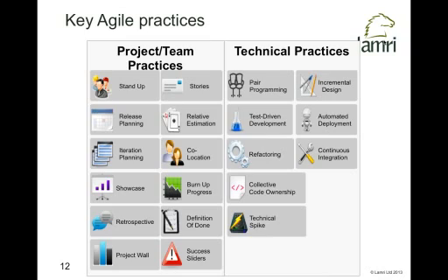It's a way of taking accountability for what you're going to do, and also sharing a problem. Who's best able to help me? And then saying, okay, we'll get together after this to solve my problem. We use stories, which are promises for conversations, to record our requirements rather than slavishly writing large requirements documents. We do relative estimation. We plan our iterations. We run showcases, like demonstrations at the end of each iteration.